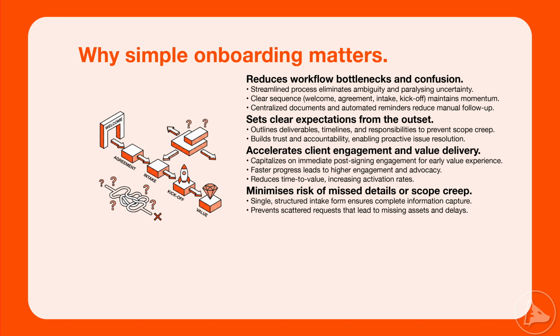You capture what matters up front. You lock scope early, and if changes come later, you've got a clean baseline to reference. It also helps you spot red flags early, like unclear goals, missing decision makers, or slow responsiveness, before they become expensive problems.